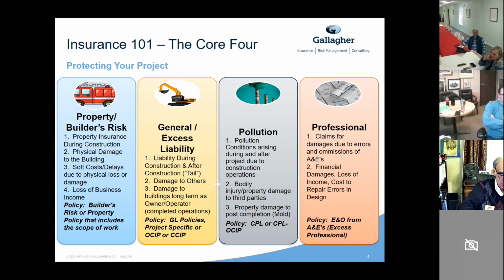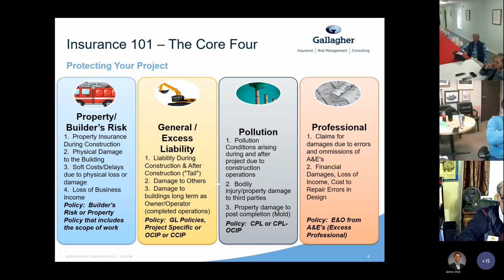The property did not have do not enter signs. It did not have security fencing. And unfortunately, it did cause a claim for that owner, even though they hadn't started construction yet. So that is something to think about as you go through and you plan these projects. When you acquire these sites, we're going to talk about doing risk assessments for the sites, but you do want to make sure that you have your ducks in a row before you purchase this property. And that way you make sure that you have the right insurance in effect right away as soon as you would be accepting some of that liability.